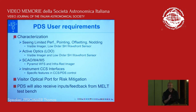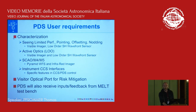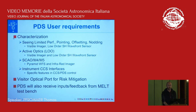We have the visitor optical port for risk mitigation — free for the moment, and when we see something happening we have the possibility. We also have the MELT test bench up and running — hopefully in two or three weeks it actually is — and we will use it over the next five years to develop wavefront control commissioning scenarios and templates so we are well prepared when the ELT is there. In addition, we can test the interface to the CCS because MELT is running on the ELT central control system as well.